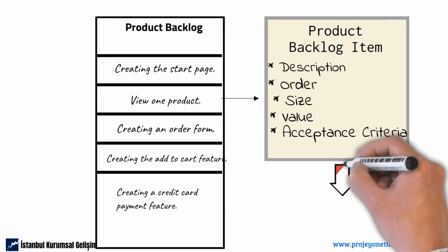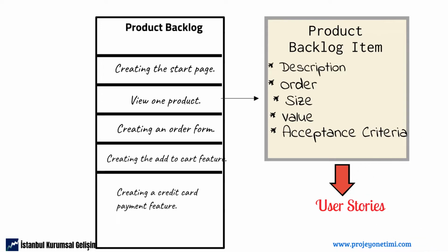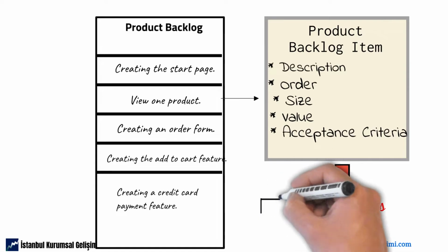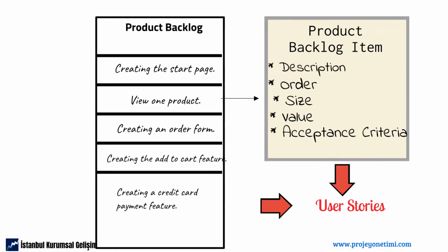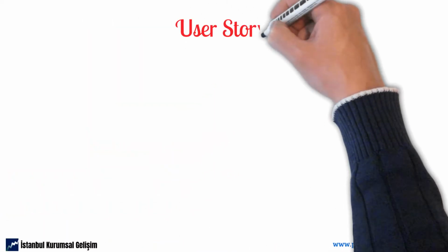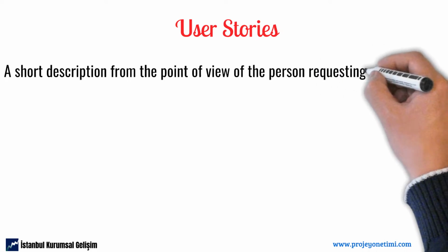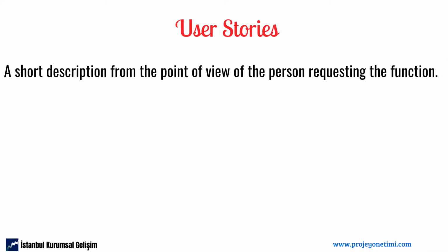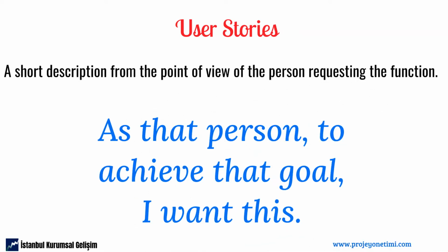In practice, the method of creating user stories for backlog items is quite common. In fact, it's so common that product backlog items are often called user stories. User stories are a short description from the point of view of the person requesting the function. A user story template typically looks like this. As that person, to achieve that goal, I want this.